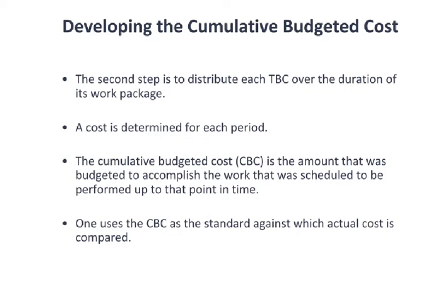So you may burn at an even linear rate. You may burn very quickly and then the expenditure slow, or you may start out with very few expenses, but then near the end of that work package, as you bring things to a close, there's large amounts of money that must be spent to reach that conclusion state.